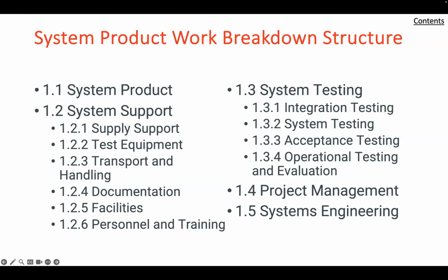So you can be thinking of that as 1.3 and below, as we have listed over here. Finally, for cost allocation and control purposes, each component is further broken down at level 5 into work packages that define the several steps of the component's design, development, and test. From this level and below, the WBS elements are often expressed with action words. For example, purchase, design, integration, test.